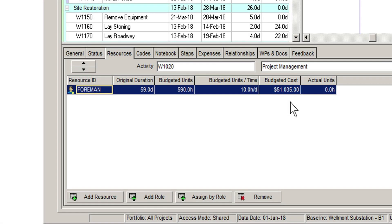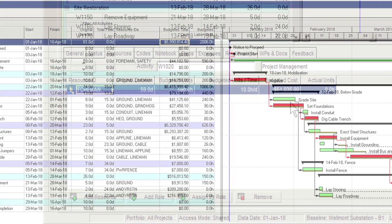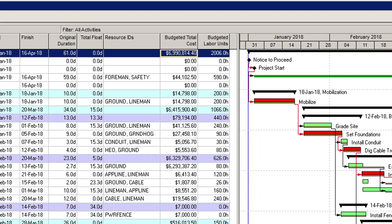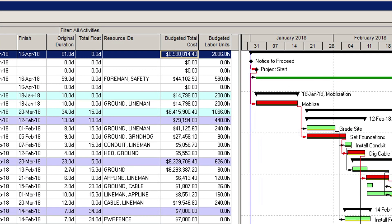Therefore, as we build up resource assignments on the activities, so we build a good estimate of the project's overall cost.